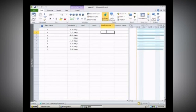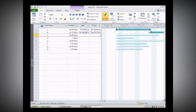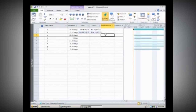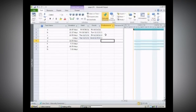For the next task, task B, we would simply type in a 1 and enter that. You can see over to the side that the task is now related. For task C, B is the predecessor. For D, B is the predecessor. For E, B is also the predecessor. Note that I'm using the numbers here rather than the task letters — you can see the numbers I'm using over to the side.